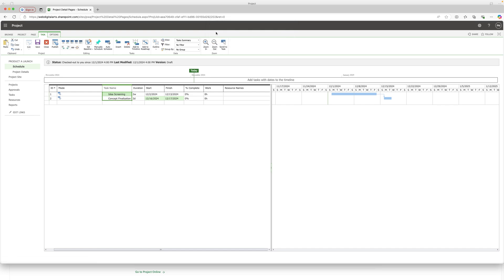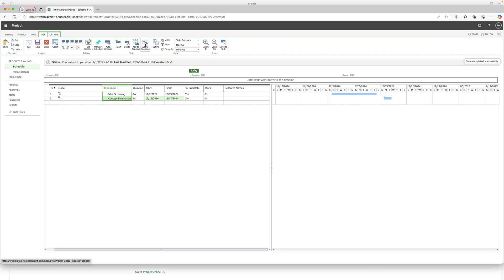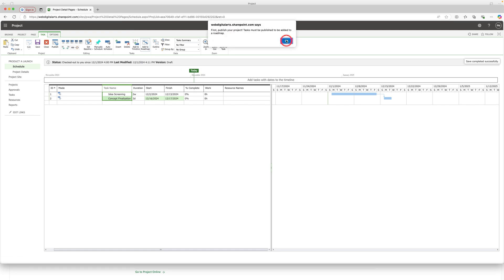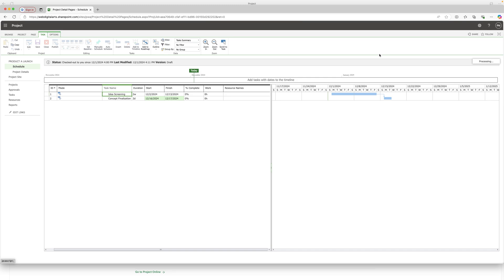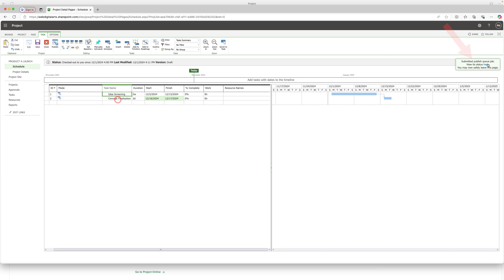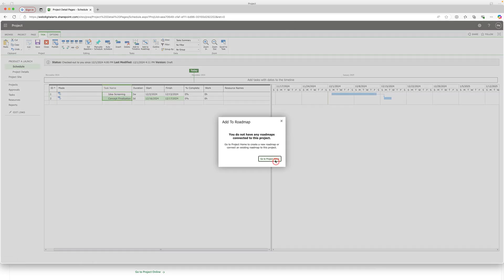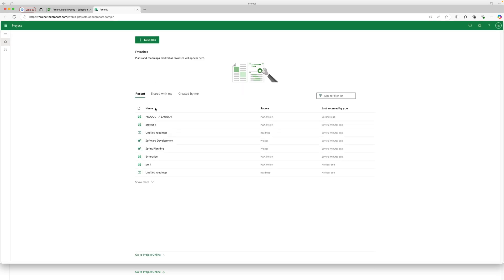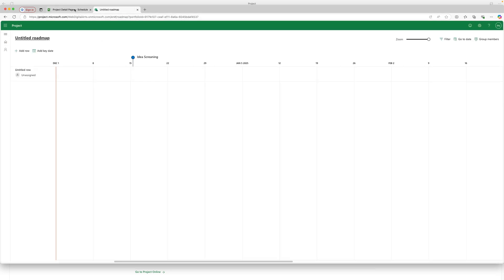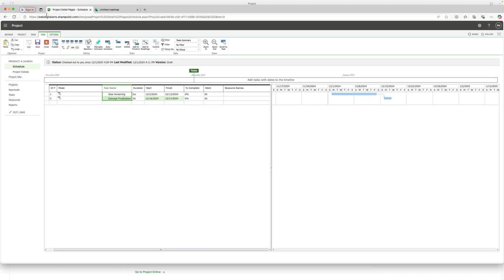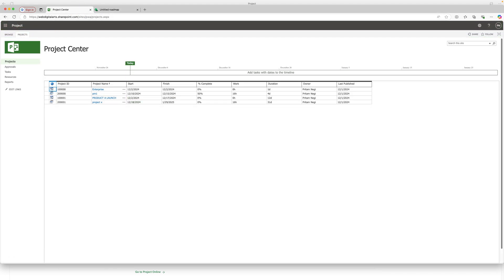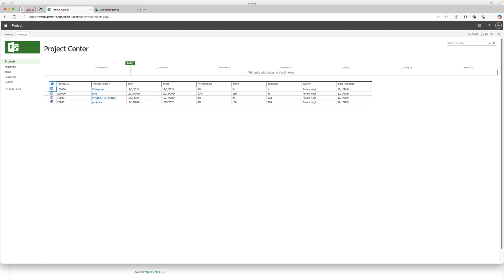To add to the roadmap, you first need to save and publish the project. Click 'Save,' then 'Publish' — you'll see it says 'Processing' and then confirms it's saved. Select both tasks again and click 'Add to Roadmap.' If no roadmap has been defined, you can define one now. This was a quick glimpse of how one can work inside Microsoft Project on a Mac.